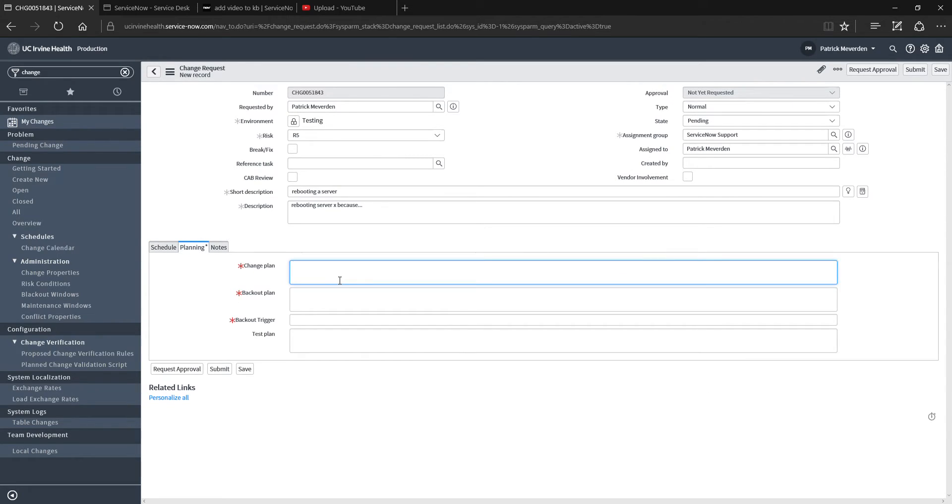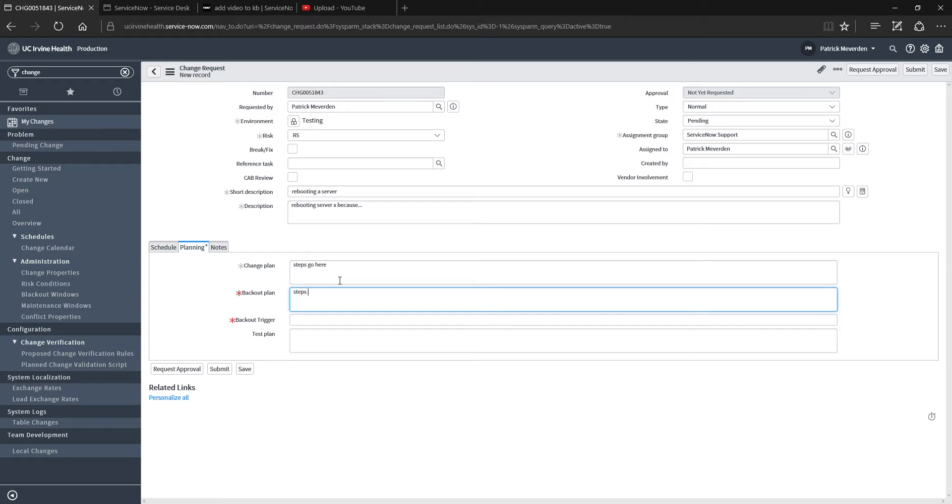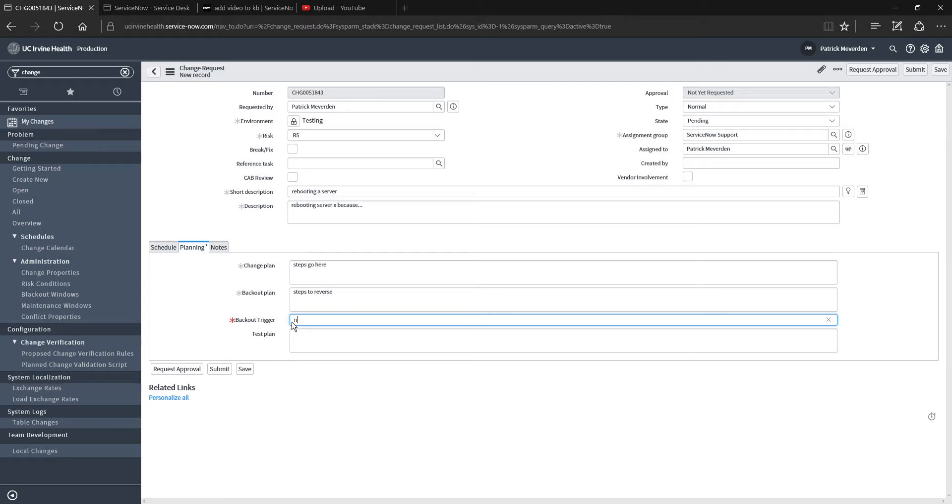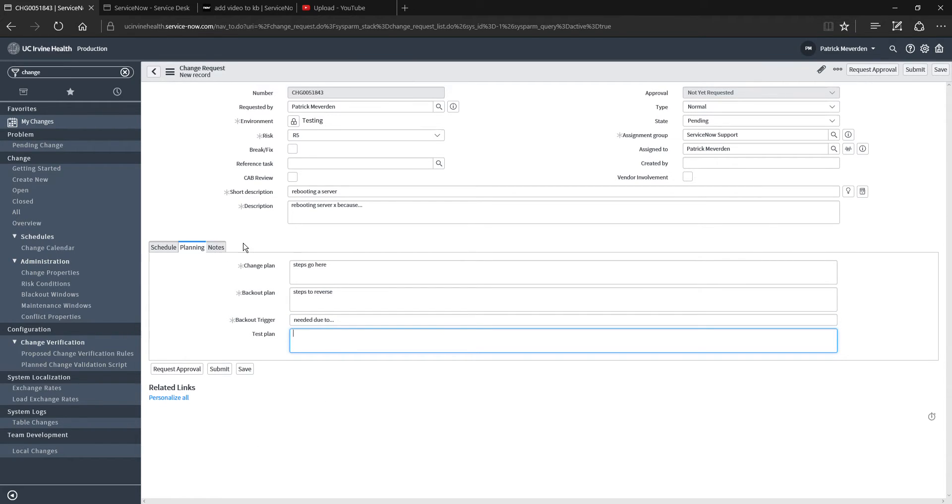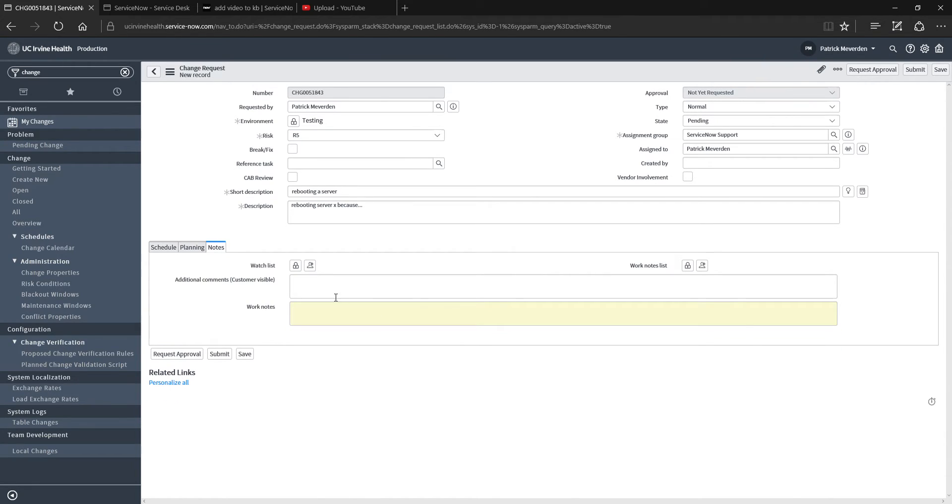Planning, what are the steps? And then back out plan, what are the steps to back out of the change, to reverse it essentially? And then when do you need to engage your back out plan? And then any test plan notes. Have you tested this in the sub production instance? What were the results? And then any additional notes can go here in the work notes field.